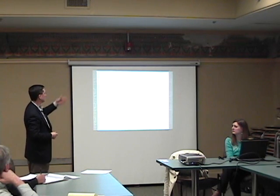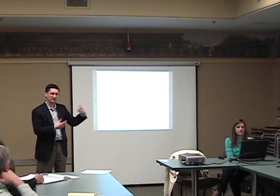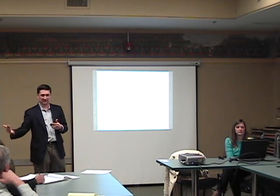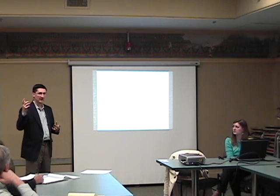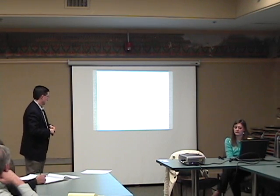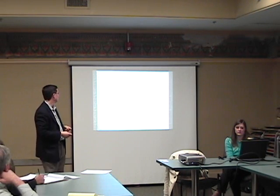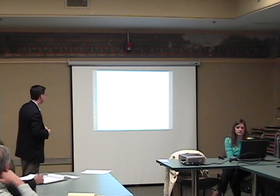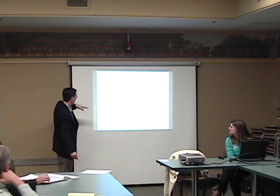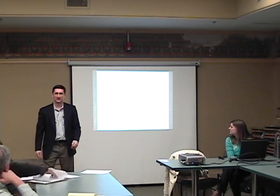We worked with Felton Electric. We got the number at $107,000. There were some increases there. Having Cleveland Public Power come in and do all the main switch gear and increased amperage was very beneficial, at about $15,000. Permits are expensive. Here's the kind of important part: LEED certification on this building was $1,450.